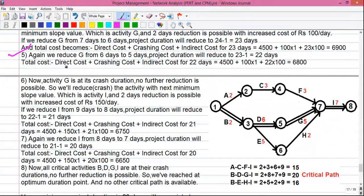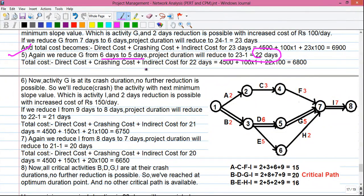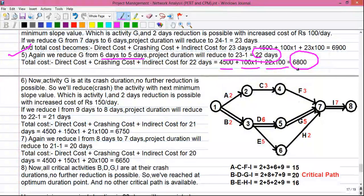Step 5: We reduce activity G again from 6 days to 5 days. Project duration reduces to 22 days. Total cost: 4500 + 100×1 + 22×100 = 6800 rupees — reducing the project cost by 100 rupees in this step.